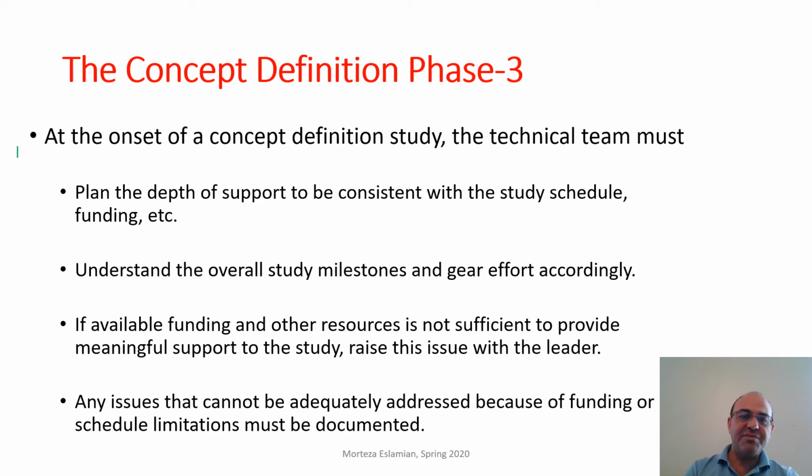So at the onset of a concept definition study, the technical team must be prepared and must do the following items. Plan the depth of support to be consistent with the study schedule, funding, and so on. Oftentimes engineers and program managers work on multiple projects, and then maybe a new project is assigned to them, like the concept definition phase of a new project may be assigned to a group of engineers who already have multiple other projects.